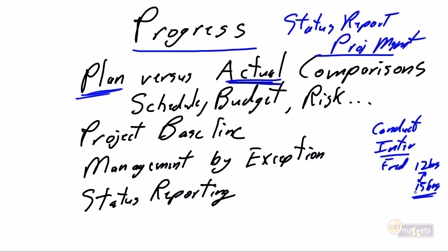That's the amount of time that we're going to take to spend a phone call. But is this a reoccurring theme? Is Fred running, I don't know what the percentage is, 5% over on this particular task? And is Mary and is Sally and is everybody else in the project? That's where the progress becomes so important, is because we track the plan versus the actuals for every task, for every week.